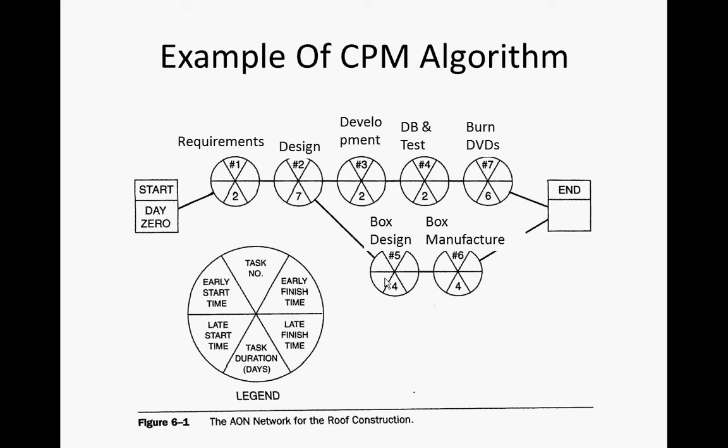Late start of this guy. Okay, so 17. And what's the latest we could start this without delaying the project? 13. Okay, now, can we do this yet? No. Why? Because it has a dependency.